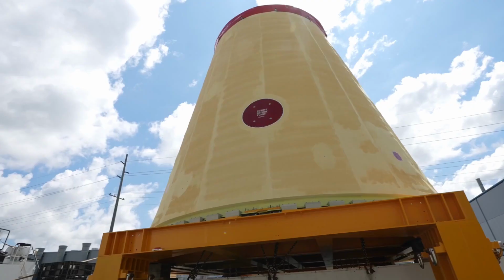The remaining SLS hardware for Artemis II is at the Marshall Space Flight Center in Huntsville, Alabama. The Launch Vehicle Stage Adapter, or LVSA-2, is ready to be transported by barge to KSC. Like the ICPS, it can't be stacked until the core stage is mated to the boosters. NASA's Pegasus barge also has the Core Stage 2 delivery from New Orleans, and possibly also another delivery from New Orleans to Florida that was delayed based on the rescheduling of Artemis II and III announced in January.